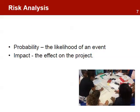The next step is to analyze risk based on the levels of impact and probability. Probability is the likelihood that an event can occur. An impact is the effect that the event can have on the project. Each risk can be ranked using a simple scale of high, medium, and low.